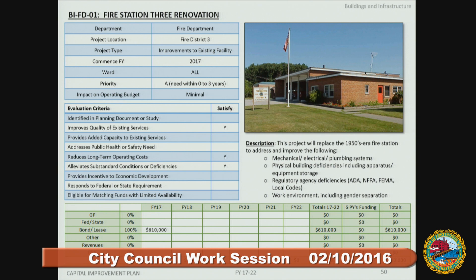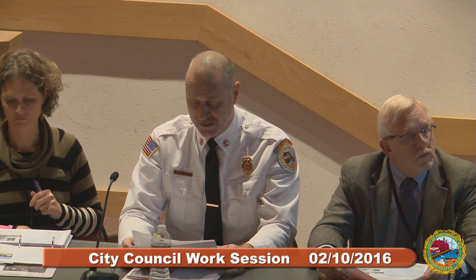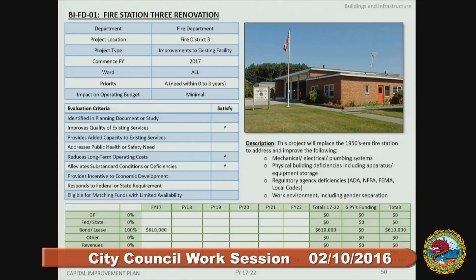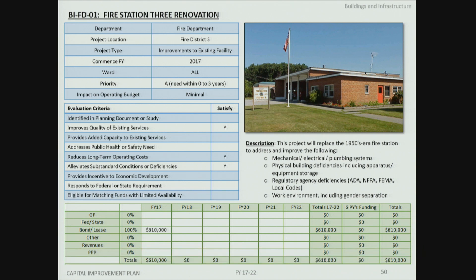Under buildings, the next project is Fire Station 3 replacement, identified as an FY17 bond lease. After feedback from previous councils favoring replacement from scratch, the department has re-evaluated and is now looking at renovating the station to get 5 to 10 more years of service life, addressing mechanical, electrical, physical building deficiencies, and regulatory upgrades not completed in previous renovations.